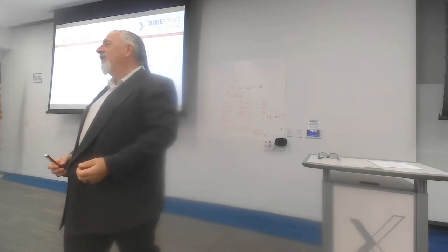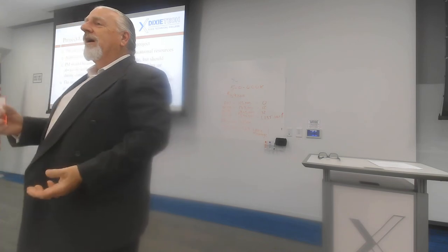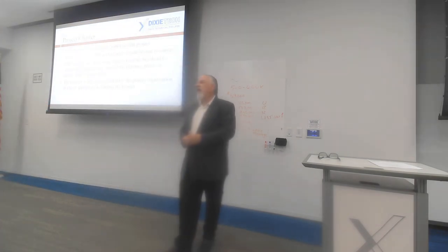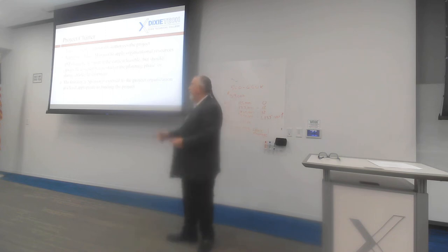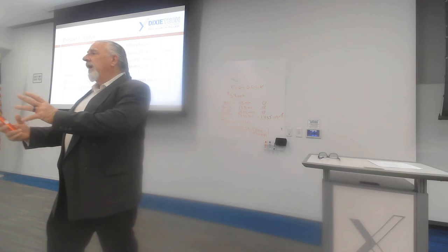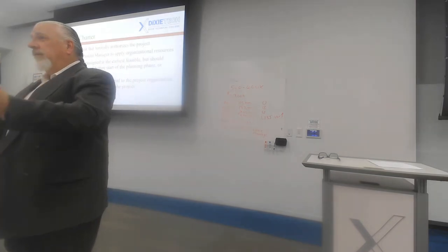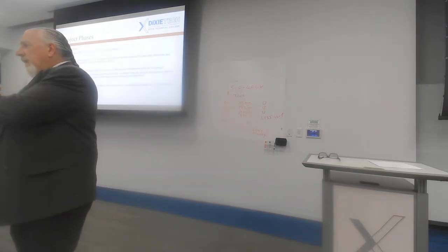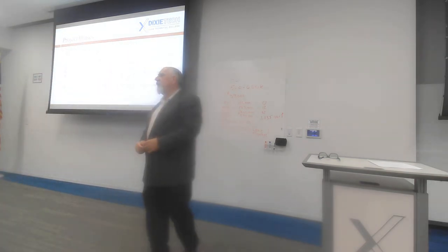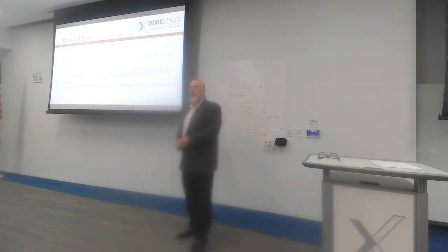But maybe, you know, you're lean and you don't want a lot of inventory. So you've got the bank telling you you've got to have it. And one of the covenants that's often in SBA lending is your milestones on your project, because a lot of times you're taking money to make something from nothing, and it's needed that you get to those end milestones for their investment to be backed.